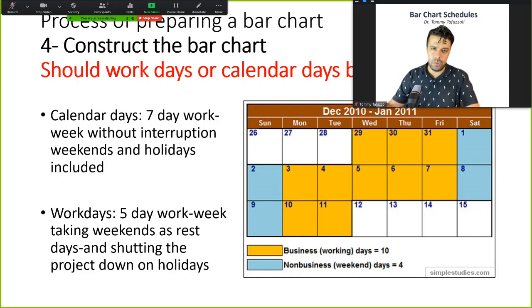Okay, so what makes it challenging is that for different activities in a project, you could have different logics. For example, for the work that involves laborers, which is almost a majority of construction activities, you cannot schedule them on a weekend if the schedule tells you that we are on a 5 day a week schedule.